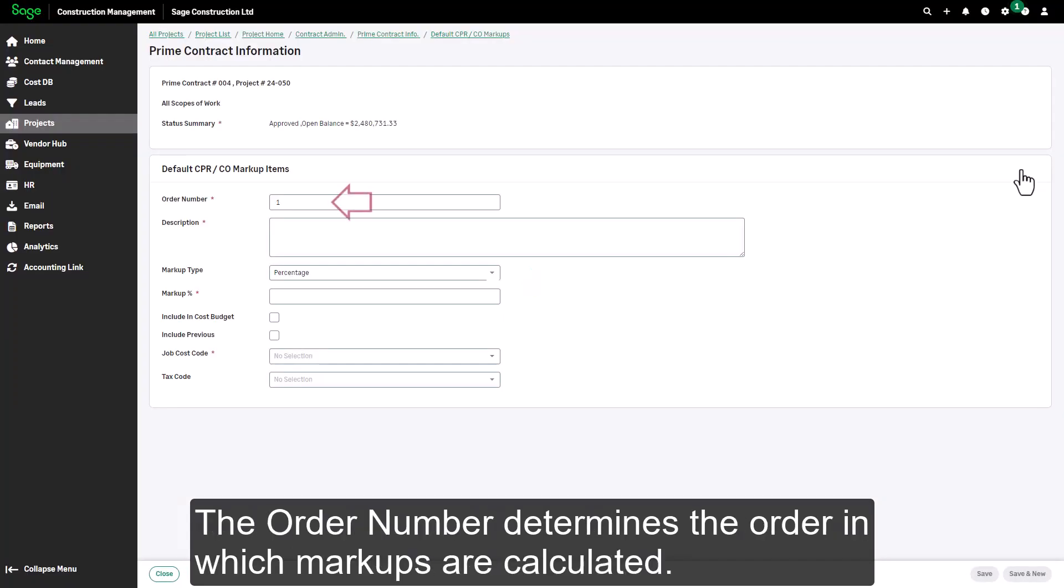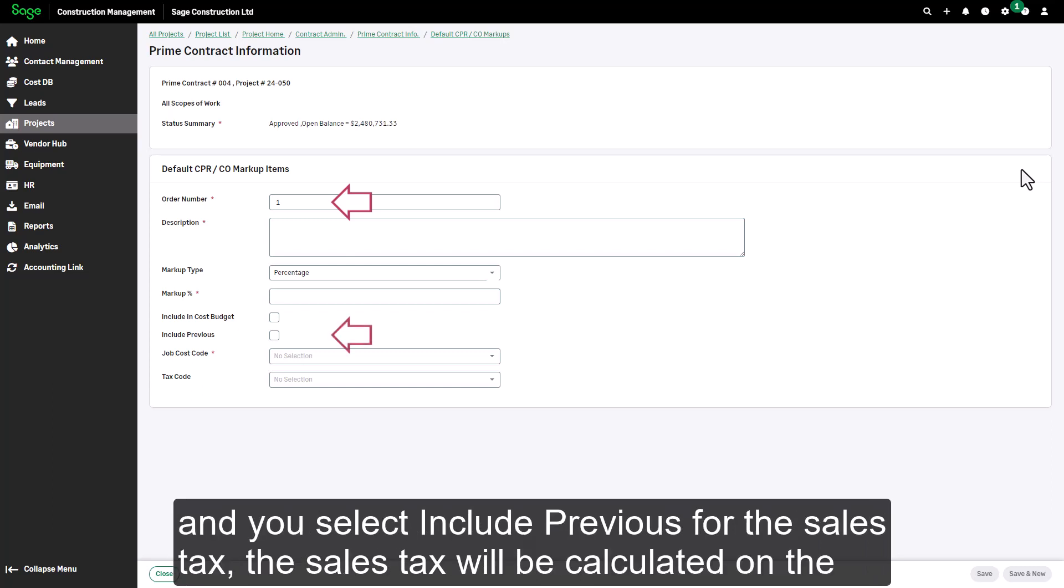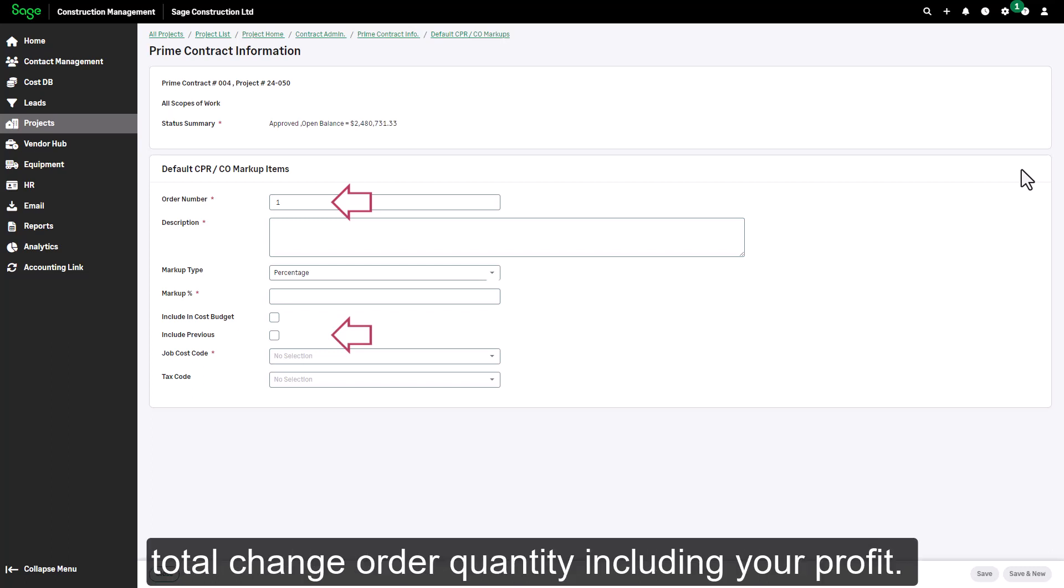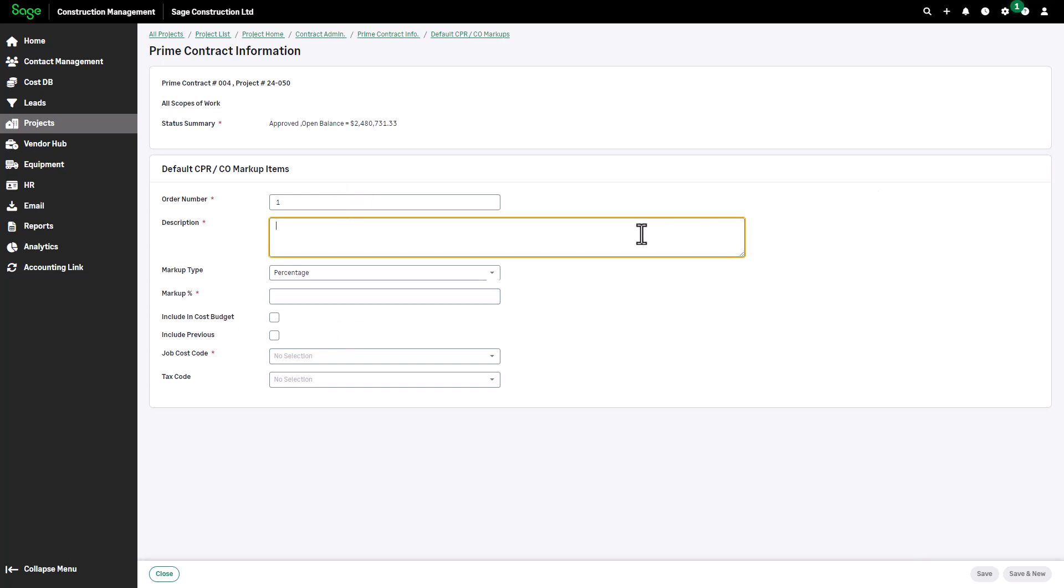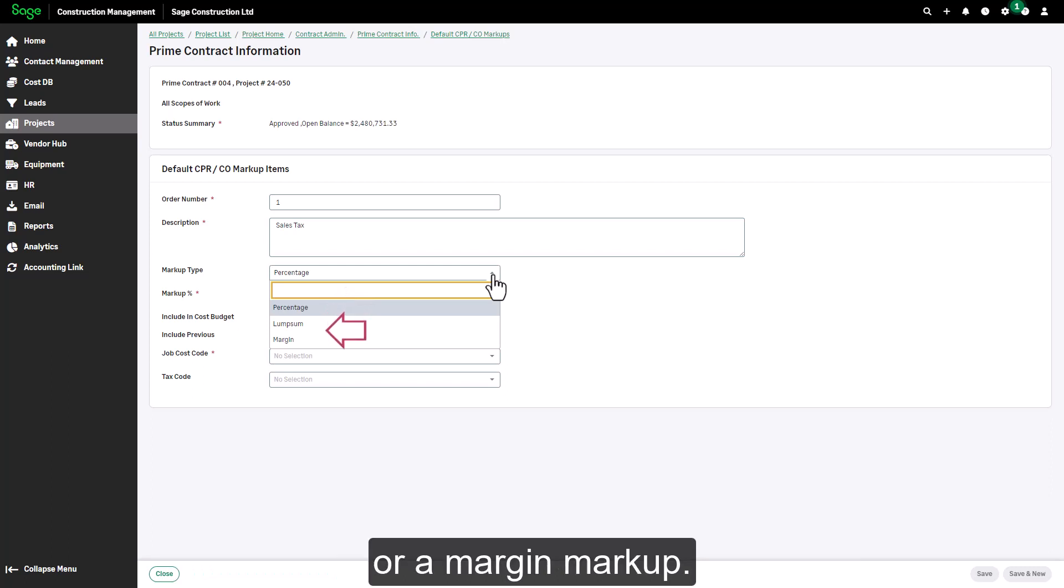The order number determines the order in which markups are calculated. For example, if you apply a profit markup first and a sales tax second, and you select include previous for the sales tax, the sales tax will be calculated on the total change order quantity including your profit. The markup type lets you indicate whether this is a percentage markup, a lump sum markup, or a margin markup.